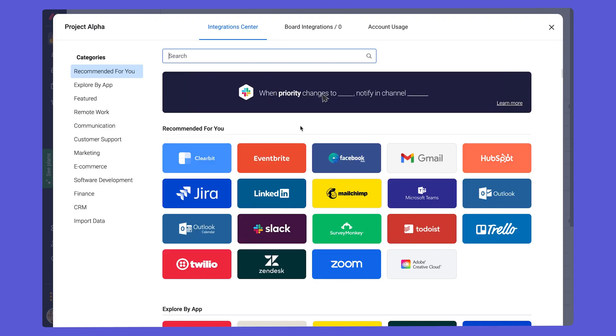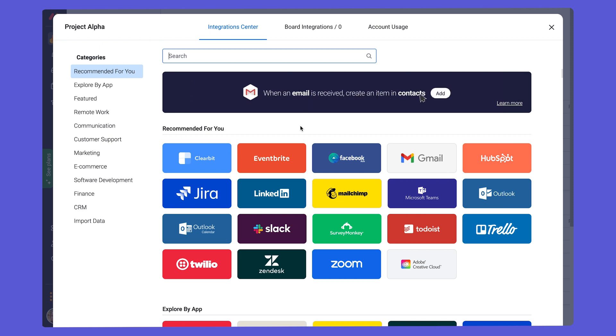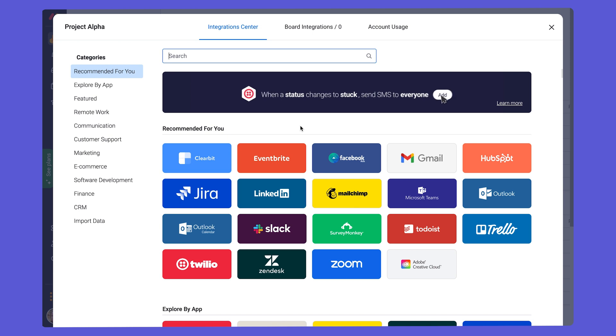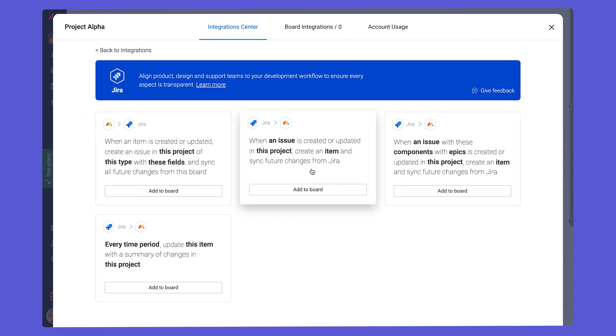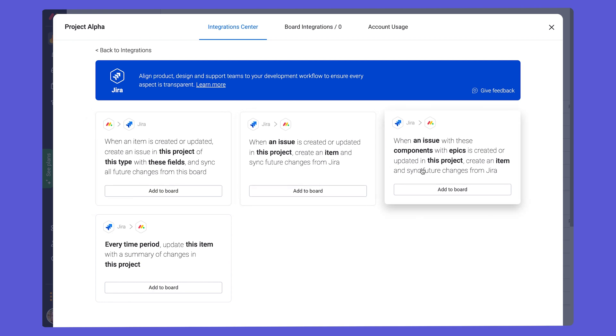Some other native integrations which you might want to check out are Jira and Salesforce. If you have some team members managing tasks in Jira and others in monday.com, you can ensure the task lists are kept consistent across these platforms using this integration. So if we click on the Jira here, we can see different integrations that we can add to the board.